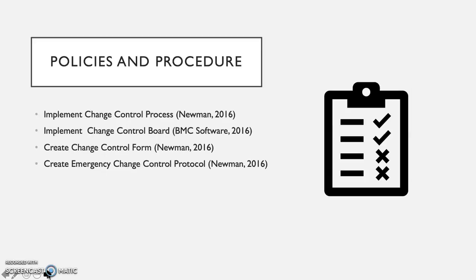The change manager will oversee and manage all aspects of change procedures, and a change advisory board is responsible for assessing high-risk requests that the approver will accept or deny. And the implementation team will be the IT staff members that actually make the changes. This sample board is derived from a blog that BMC Software produced.